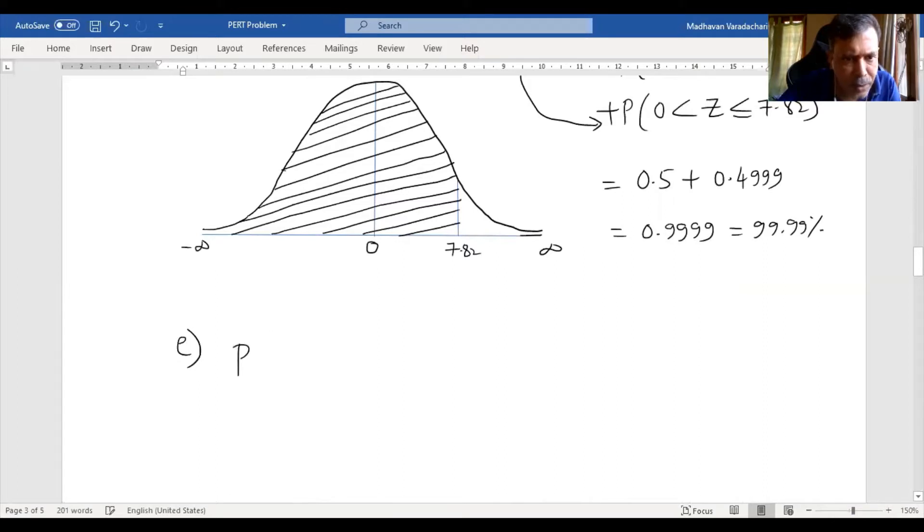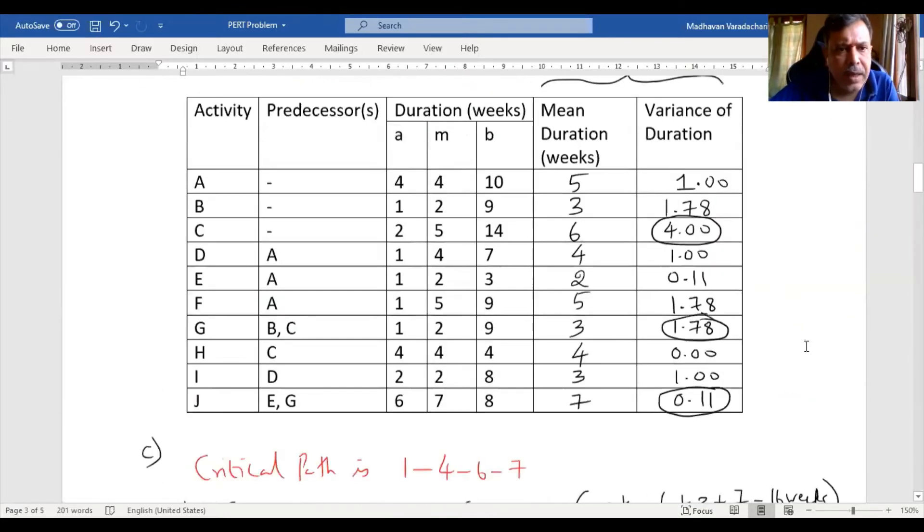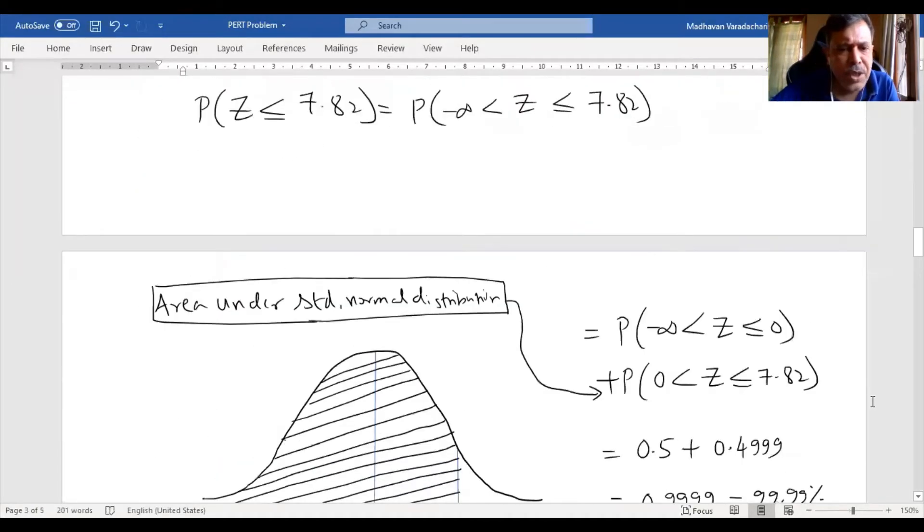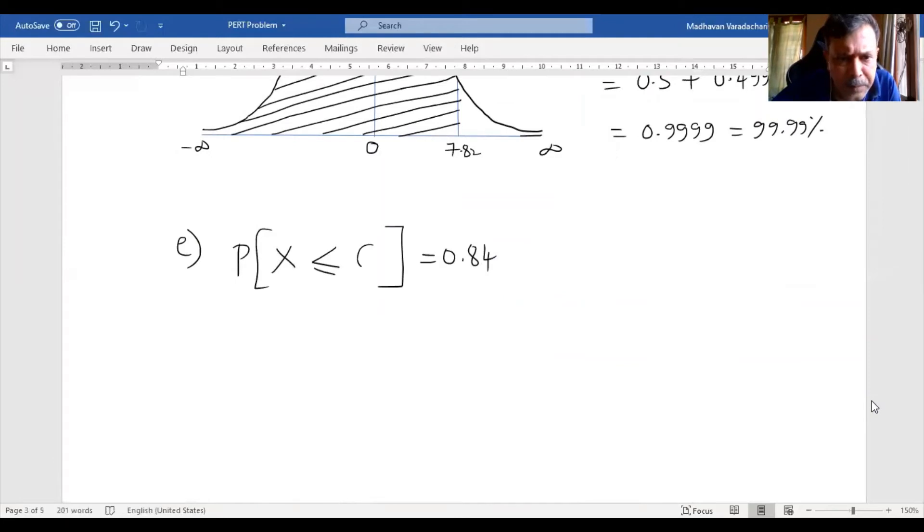Question E, the probability is known. We are supposed to find what is the duration. Probability is given as 0.84. We are supposed to find the duration, which we will consider as capital C. We will use the standard normal conversion.